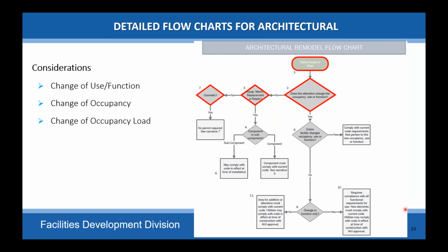So let's look at if it was cosmetic. Cosmetic does not typically require a permit. We're looking at paint, carpeting, tile. You're just replacing what's there. What we do ask is that you notify the compliance officer for the facility and let them know there's some work going on, so they don't come out, see something happening, and not know what it is. But this is more of a courtesy. You can repaint. We've actually gotten projects in that were 100% cosmetic. We do not require a permit for that type of work.